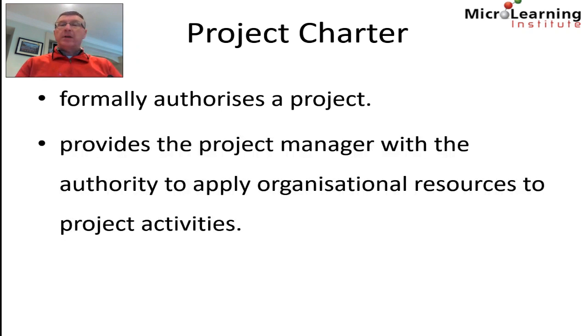Also, once the project now officially exists, the project manager now has the authority to apply organisational resources to project activities. So this means that the project manager is now authorised to schedule meetings, issue purchase orders, allocate resources to tasks and so on in order to deliver the project. Whereas prior to the existence of the project charter, this would not have been the case.